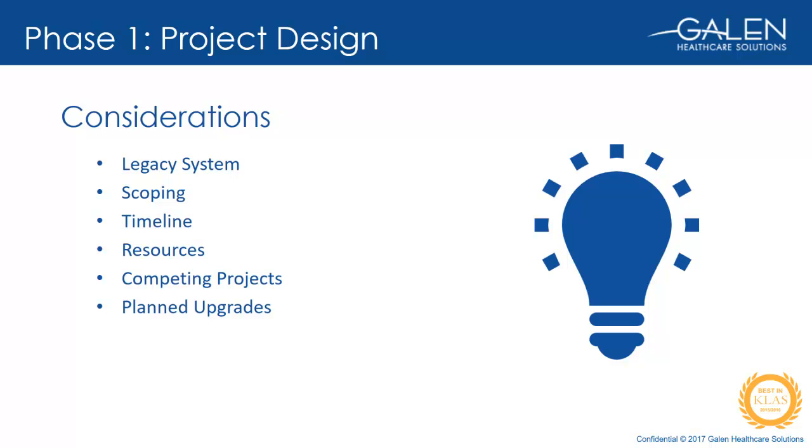The overall scope of the project is determined with the statement of work and when it is signed. However, here are a couple of examples of details that will need to be ironed out during the kickoff call. Patient demographics. Should deceased patients be migrated? Also, should test patients in the source system be migrated over to the target system? Secondly, encounters. Are all encounters in the source system going to be migrated, or are only encounters tied to clinical data that's in scope going to be migrated?